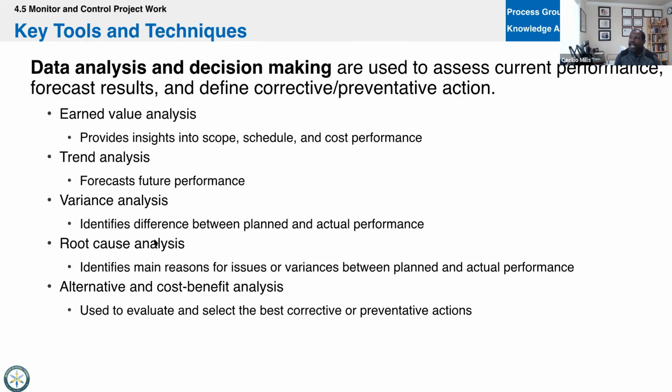Right. And it'll say after the risk event took place, you went back and you reevaluated the risk and determined that you ought to use storm shutters instead of boarding up the windows. This is an example of, it'll say A, alternatives analysis, B, risk mitigation, C, risk analysis, D, change request. You'll get some question like that where we talked about risk, but it turned out it was an example of alternatives analysis.